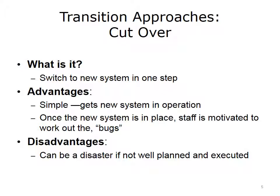Preparing for a successful cut-over often includes simulating what the operation will look like when the new system is in place, especially to ensure that the performance of the new system will be satisfactory. Of course, there is always an issue with simulation, so there can still be risk. But most important to a successful cut-over is having a test environment that effectively mimics the operational environment. This way, new systems can be tested thoroughly against workloads that are representative of operational use.